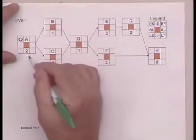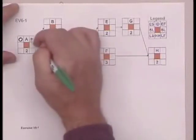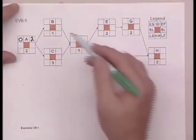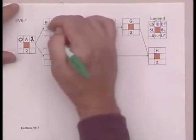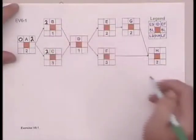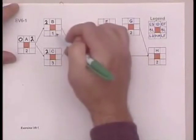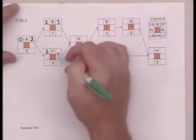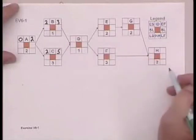And since that activity is supposed to take two days, let's say, the earliest finish time is two days. Once that activity is done, then B and C can start. Those become the early start for B and C. The duration of B is one, so it's three. The duration of C is three, so it could be done on the fifth day.